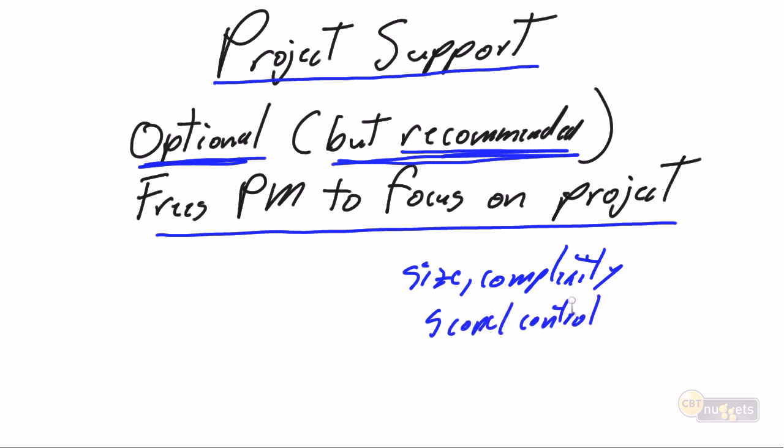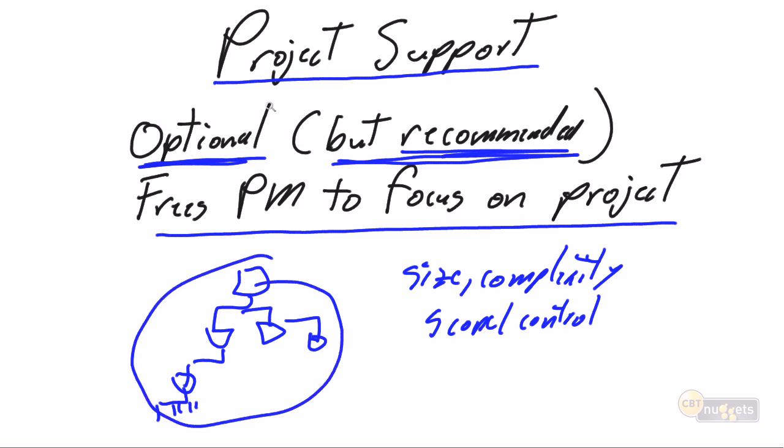again, grows and grows, where we're bringing in more team leaders and more team leaders to create an effective project organization, where we have team leaders or super team leaders with team leaders underneath them, finally to the team. As we start to grow the size of our project, it will make a lot of sense to bring in additional project support. They're not trained project management resources, but they're there to take on the administrative activities, to do the timekeeping, to do the filing, to do everything else, to free the PM and the team leaders to focus on project activities and not on administration.